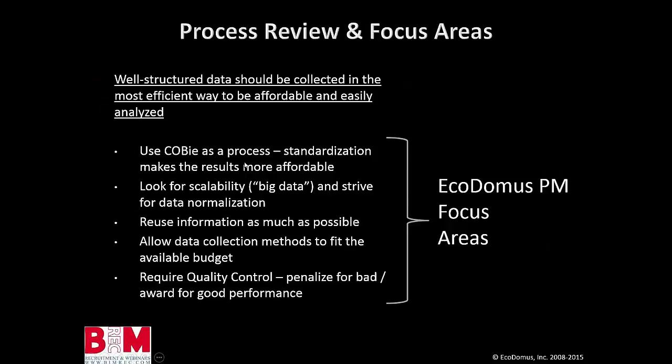So the focus of the EcoDomus PM, the application that I mentioned earlier, is utilizing COBie as the process. We definitely recommend standardizing on COBie because it makes the results more affordable. What it means is that if I have 200 clients and all of them have the same process, like COBie, then I can spread the cost between 200 of them. If I have to come up with a custom handover workflow for each one of them, obviously the cost is going to be much bigger.